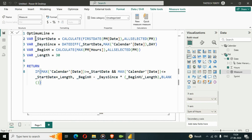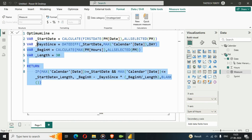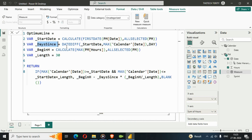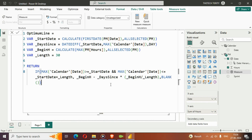To summarize what we built: start_date uses CALCULATE with FIRSTDATE and ALLSELECTED to return January 1st. days_since uses DATEDIFF from start_date to MAX calendar date, returning the number of days elapsed. begin_hours is the MAX of hours — 300. length is 30. The IF condition checks whether each date falls within the 30-day timeframe, then subtracts the burned hours from the beginning hours accordingly.